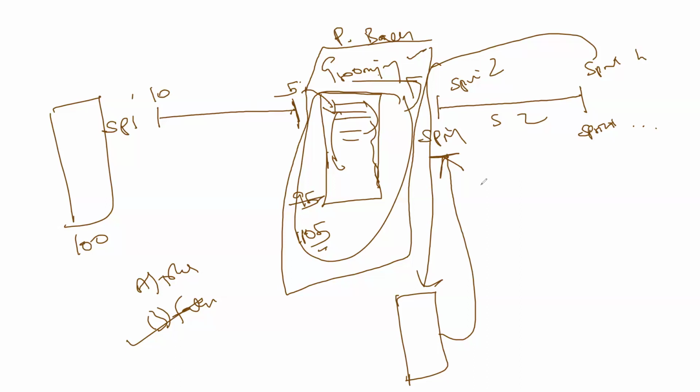Another important point for the exam. Even though Scrum is a change-based methodology, during the sprint, no change is allowed to the sprint. We are on day 2 or day 3 of sprint 1. Customer is coming and telling us, I have some new requirements. We will add it to the product backlog. We will not change the sprint backlog. Okay? Sprint backlog will not change.